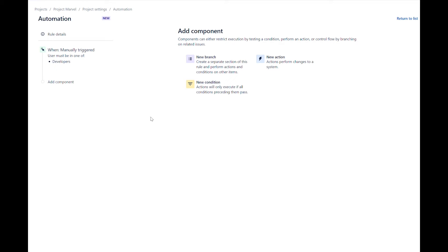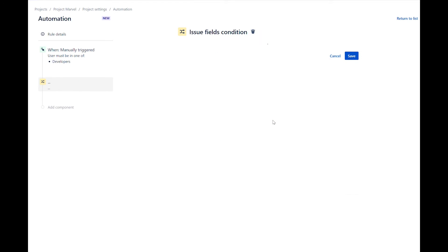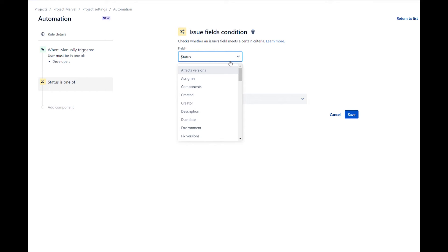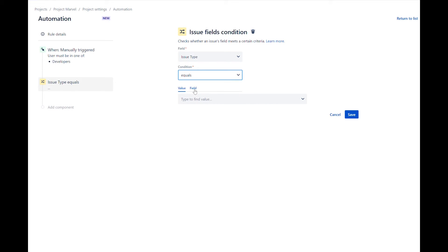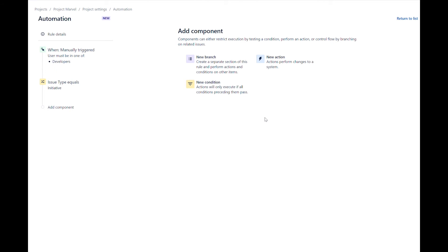Let's add a condition to ensure that this rule will run for only initiative issue types. Add a new condition and select issue fields condition. For the field value, select issue type. For the condition field, select equals. For the value field, select initiative. Save the condition. Please note that if a user is in the developer group and is on a story issue, they will see the option to execute the rule. However, the automation rule will not be executed because of the condition that we just added.